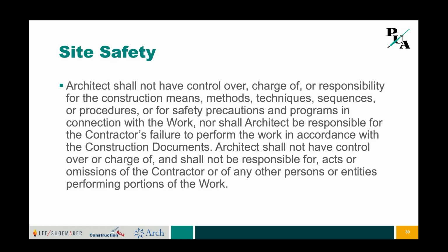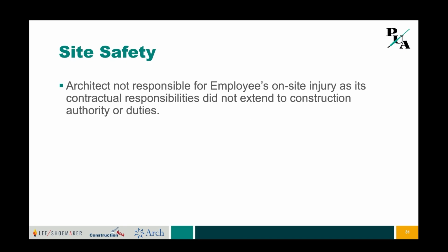At the trial court level, the trial court looked at the particular claims and granted summary judgment in favor of the architect, a win for the good guys. Unfortunately, this was reversed by an intermediate appellate court, which inferred responsibility for site safety merely because the architect's contractual duty included performing site visits. Well, fortunately, common sense prevailed because it got appealed again to the highest appellate court in Louisiana, which reversed the intermediate appellate court and said the trial court got it right, finding that the terms of the architect's contract were neither unclear nor ambiguous and specifically disclaimed responsibility for safety precautions in connection with the work.